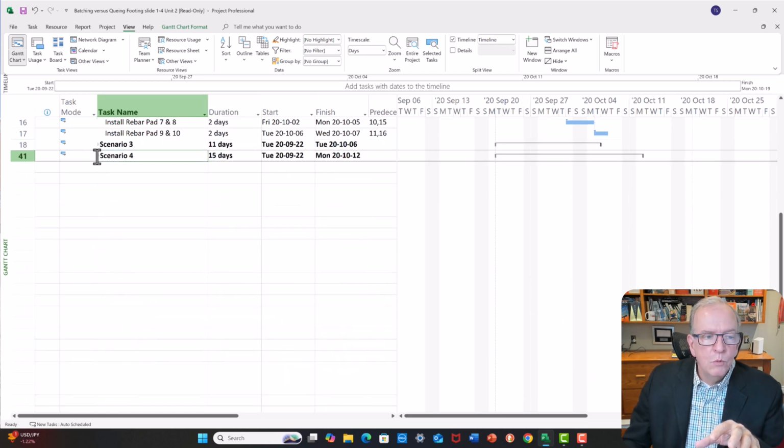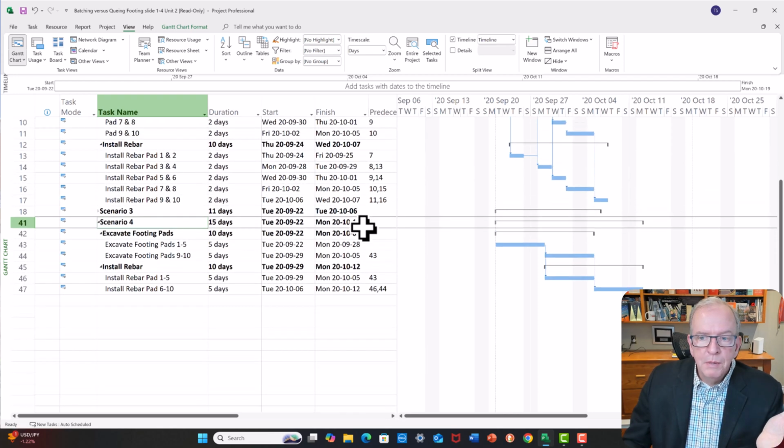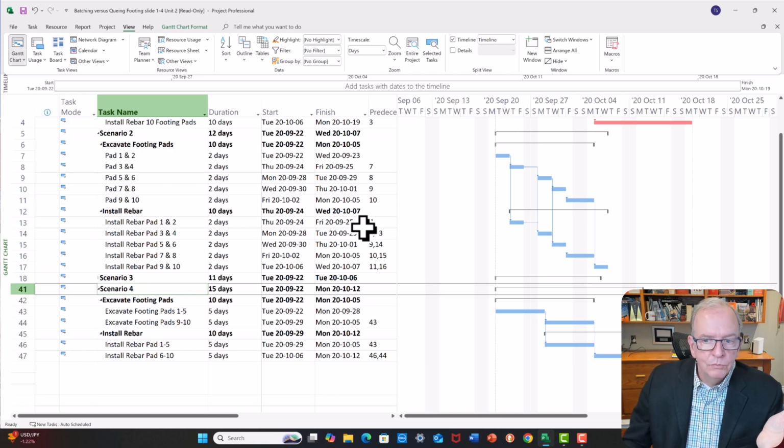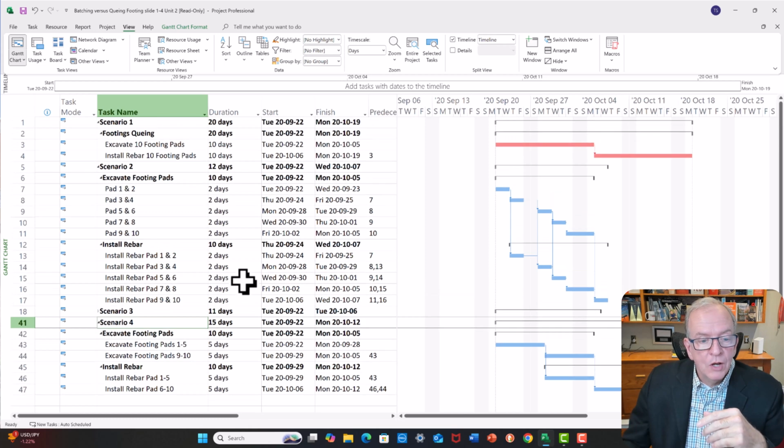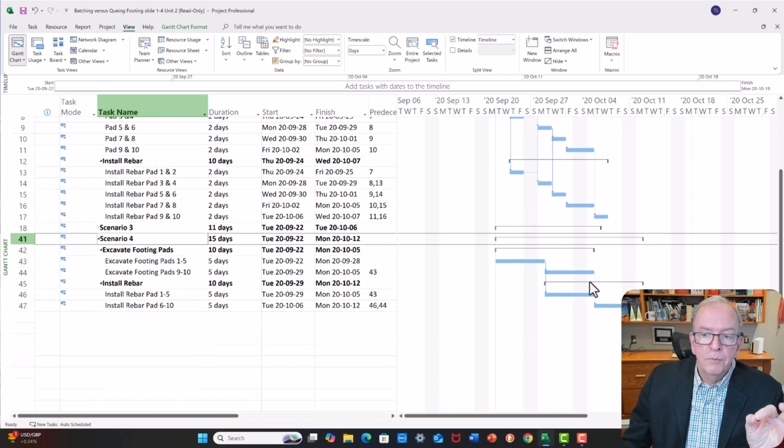And even maybe when you're looking at the scenario that I showed with the batch of 2, maybe you want to go to batch of 5, because maybe a batch of 5 is better than the batch of 2 because of space. Well, what's the difference between the batch of 5 and the batch of 10? You're saving still 25% on your time by going to a batch of 5. So then that's where your decision comes in. What is best for this project, right? Determining the appropriate batch size.